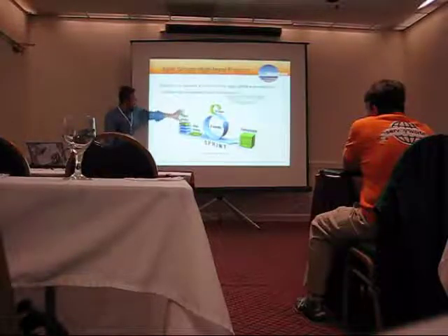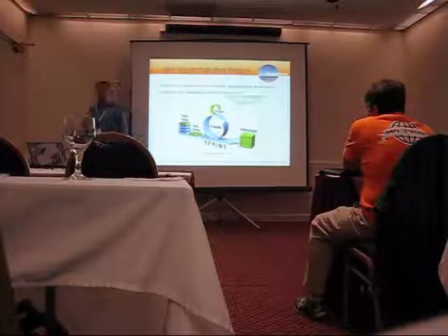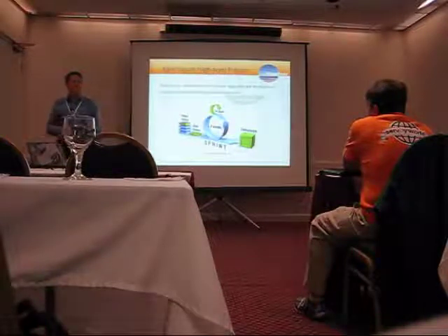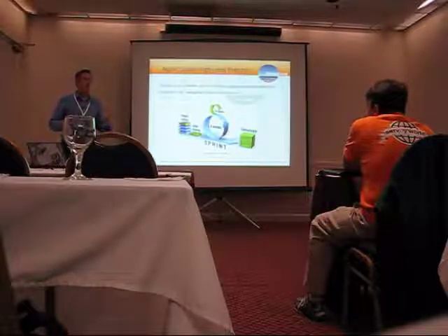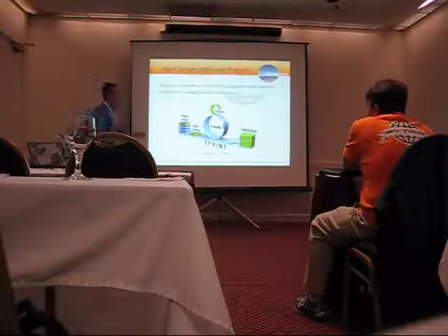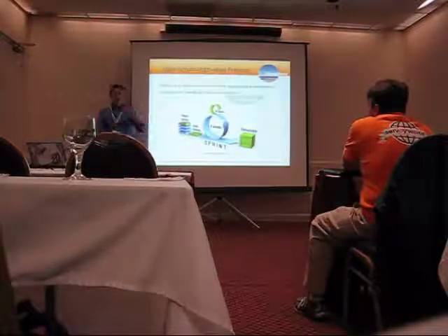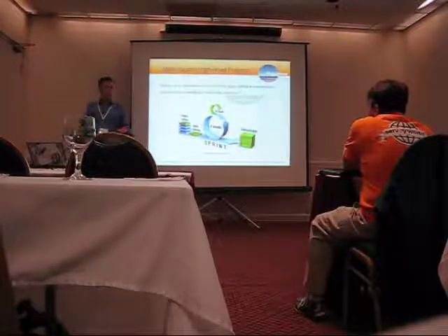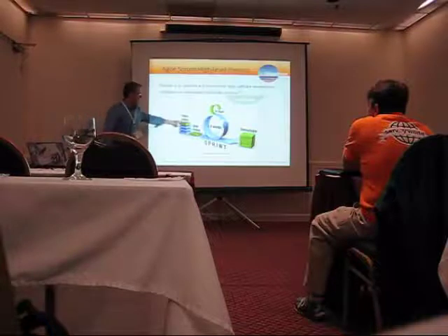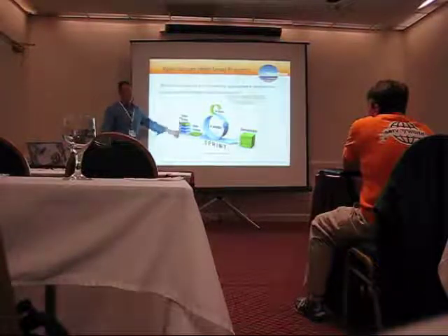Basically what happens is you start off with a product backlog. A product backlog is just a list of features, things that you want in the product. In many cases, they're expressed as user stories. We'll talk about that in just a minute. When you start a sprint, by the way, the product owner, we'll talk about the roles in a minute, just takes all these items and sorts them, high priority to low priority.